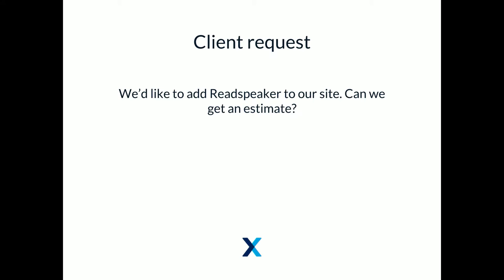And the thing I've found is that it's almost never because we totally guessed wrong and something took way longer than we originally thought, although that does happen. Most of the time, it's because whatever we estimated was not actually what we were supposed to be delivering. So the best way to get better at estimating is by getting better at defining what you're estimating. That's the point I'll try to get across here.